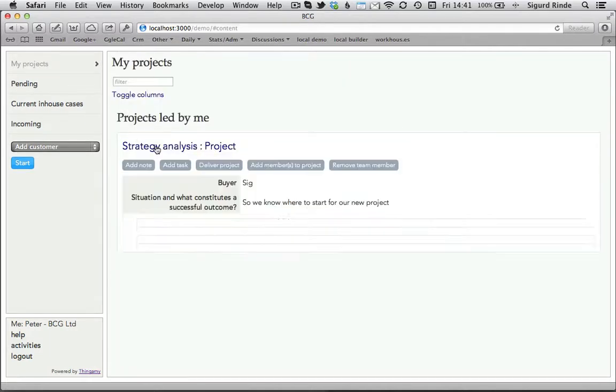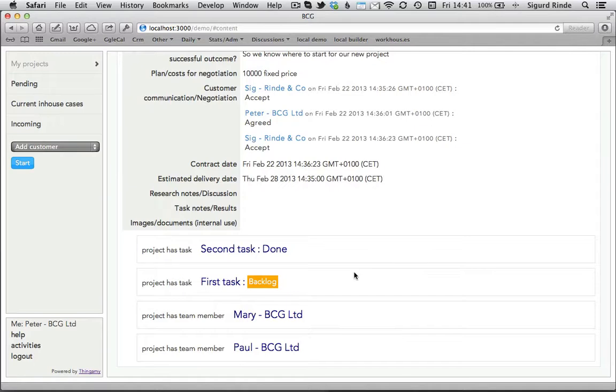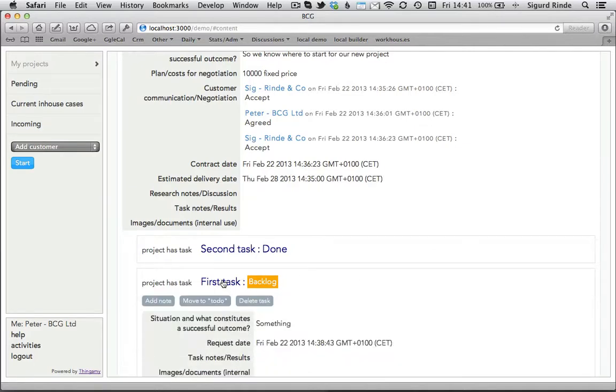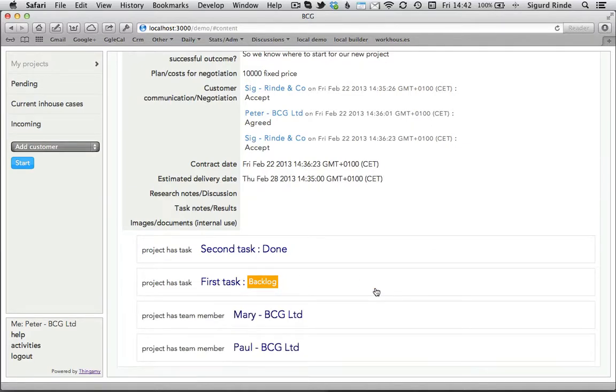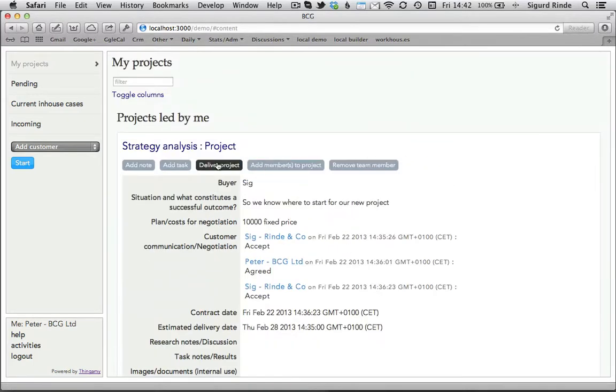And even more than that, during the process, I can even delete backlog tasks. Because what happens if somebody delivers a task, you find out, oh, that opens new possibilities. I can move an old task back to backlog and remove it or split it into two or create a totally new one and so forth. So Kanban style, I'll have to prioritize as things happen. So at this point I can now deliver the project,